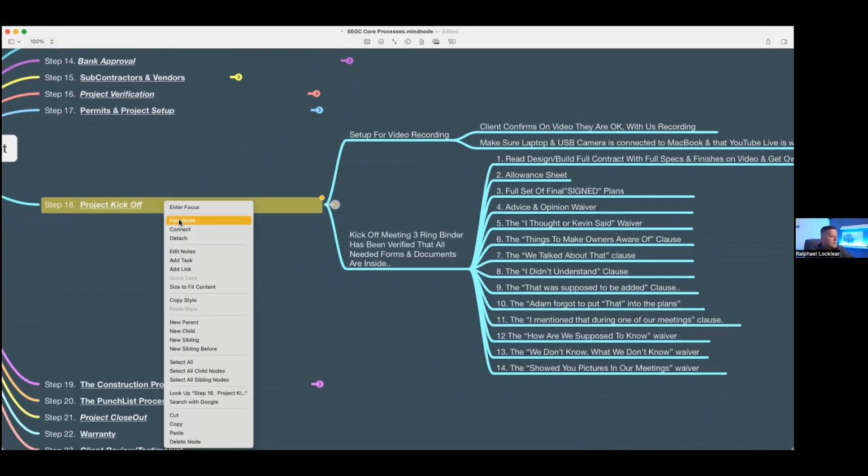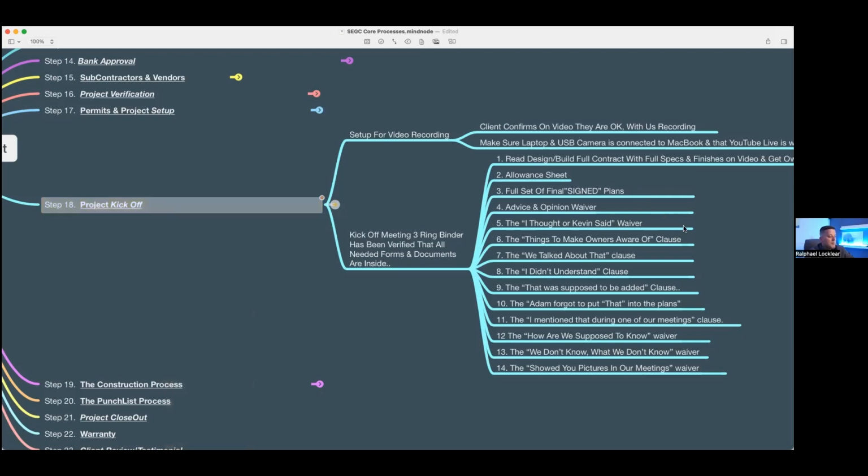So I'm pretty sure if they were to go back before you guys started breaking ground, right? They sign all this contract and they say they want the thing over there open, right? That's a change order now, right? At that point, if we get to the site and we do all of this, and you're right, it does happen. But you know what the blessing with that is? It's never an argument. It's, hey, I know we should have thought about this and we thought we could live without it, but I see we're at the under slab rough end stage. The wife and I were talking, we're thinking about going ahead and doing that pot filler. Is it too late for that?